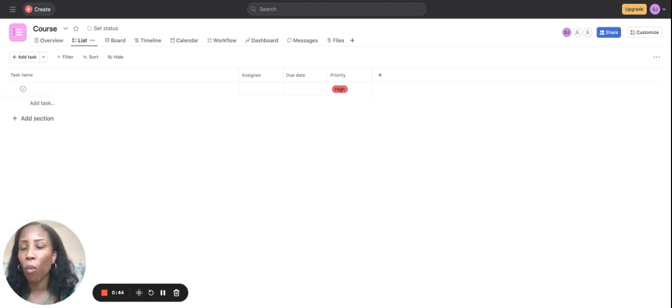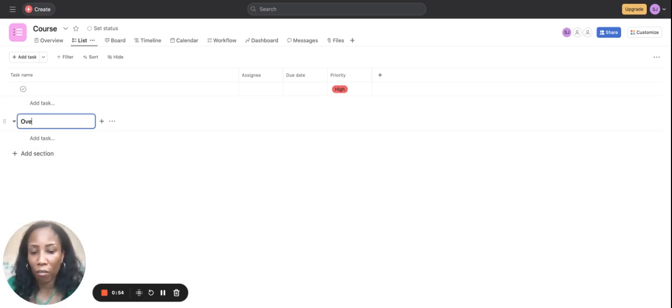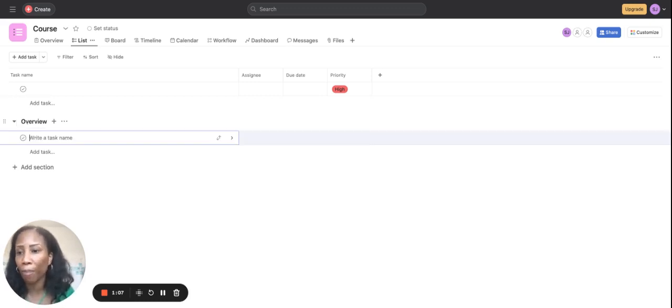So first of all, what I like to do is to break it down into categories. What are the different areas that need to be assembled to create this course? So within the sections, I'm going to create those categories. The first category is going to be the overview, which gives an understanding to all the team members what the course is about, the reason for it, when the deadlines are, just key information so they understand what the course is about.